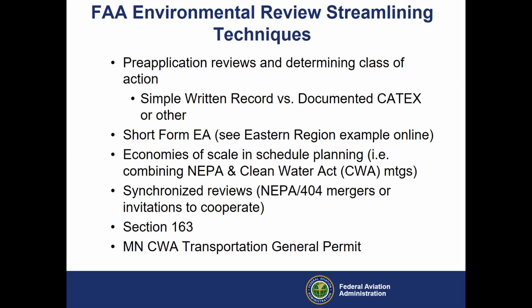Second to the last bullet here, section 163. I think people probably heard that or whispers of that here the past couple of years, but section 163 is section 163 of the FAA Reauthorization Act of 2018. And that basically says, well, if there were some non-federal funds used to, let's say, purchase some land somewhere as part of the airport. Then, let's say that was 20 years ago, and now you've got a hangar project out there on that piece of land that was purchased without federal funds.